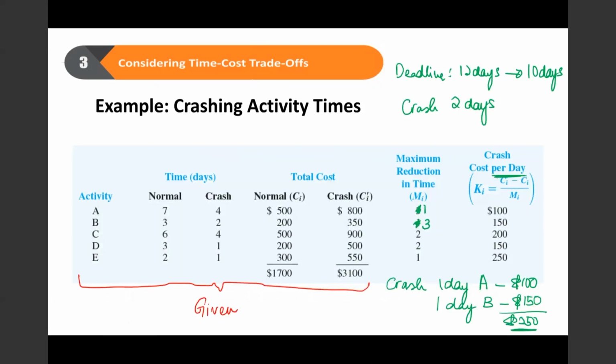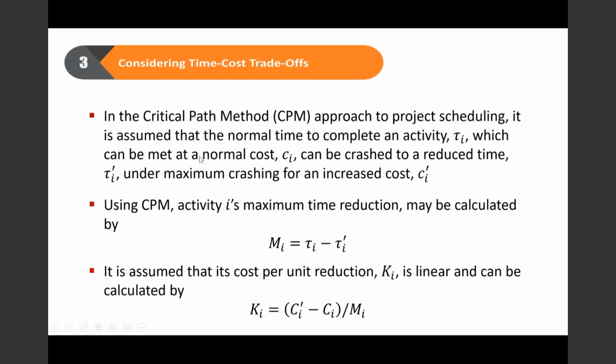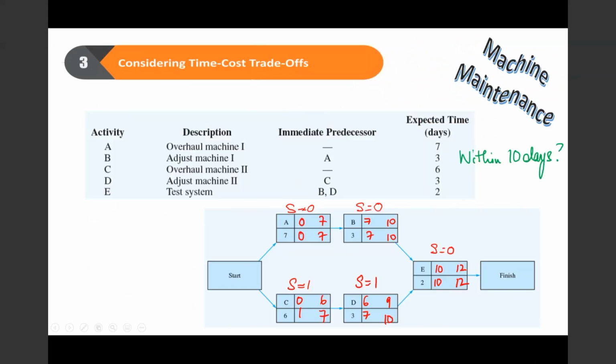So the activity C and D also have to reduce the activity time? Okay, when you do this, because A and B is at the top, let's say this becomes 6. Let's do activity A first. This is now 6. Okay, so I'm just going to delete all this. Let's look at what I mean. So activity A is 6. Activity B starts with day 6. Takes 3 days, so this is 9.